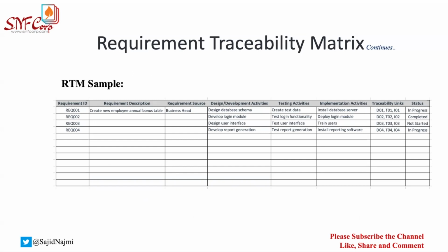Or if there's a company rule that you have to use a sequence of numbers, as an example, say your project name is, let's say, anything, like give any name, US. Your company might ask you to use requirements that start with the prefix US. You will write US and then probably your tool name. Let's say your tool name is Amazon. Your company might ask you to use numbers this way, US AM01, so that everyone knows, okay, US as in this was done in the US and this is for the Amazon project. So US AM01, US AM02.